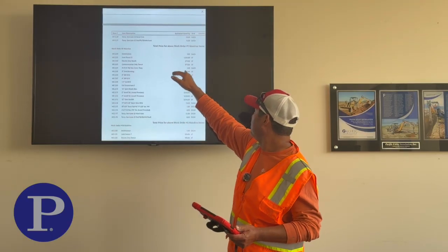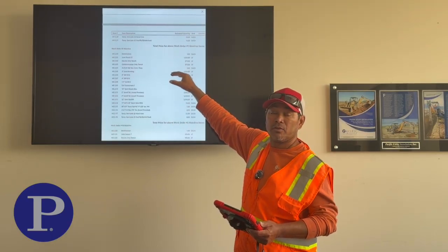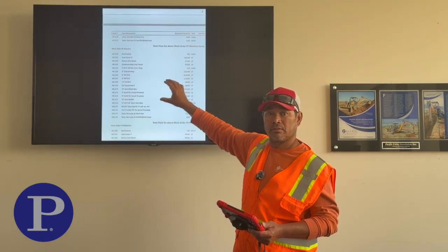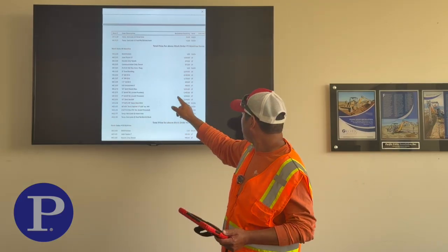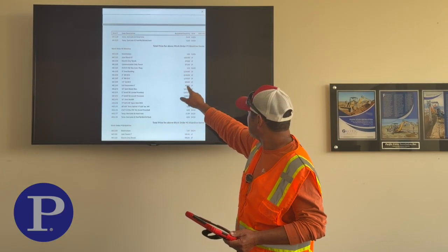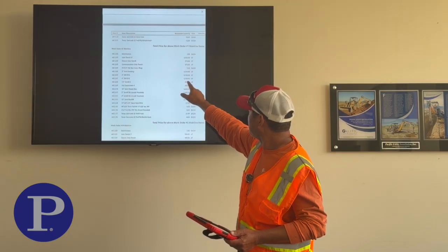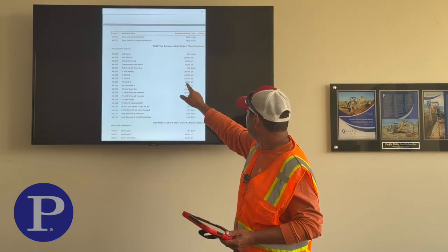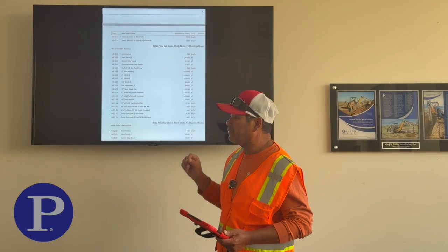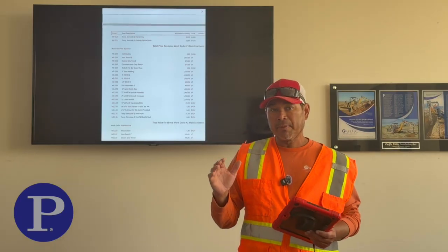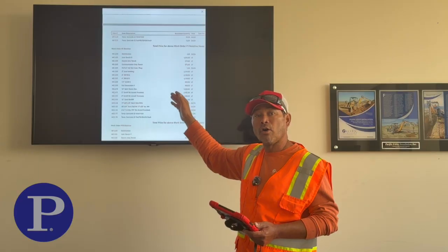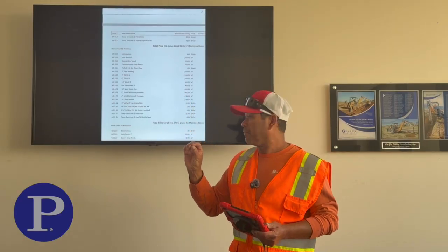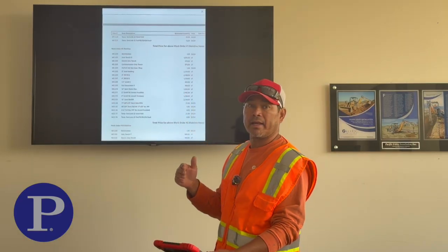So you don't need to order this amount. Just go with 2,000, and then if you need a little more, you add it. You're also going to place a little bit of 4-inch and a little bit of inch and a half for street lights. So when you order, don't go above. Go a little less, and we can add.